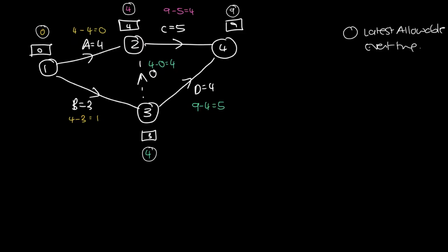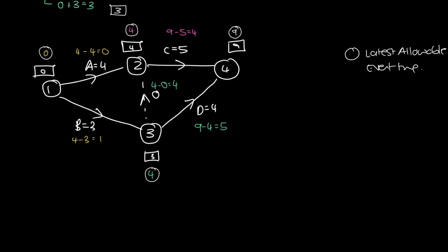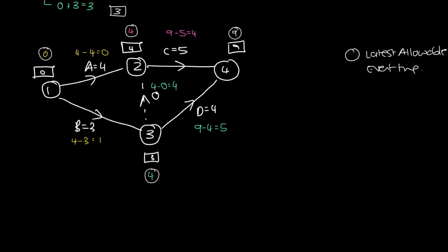Okay, so we're actually not done filling in information on our graph. Let's do that. We're now going to add a triangle to the mix, and the triangle is going to represent the event slack time. It is basically the difference between the latest allowable event time and the earliest time the event can start. What's the play around each event?